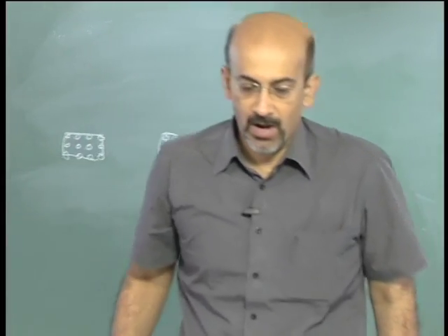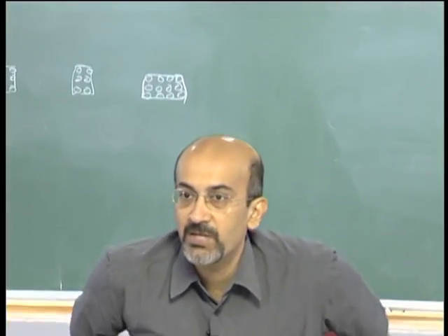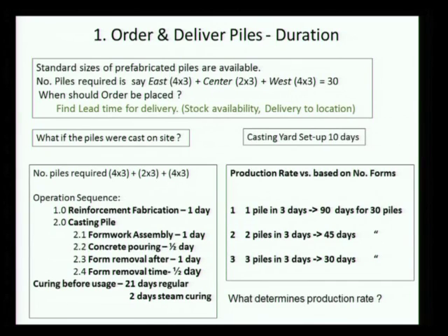Now, I'm not giving you information on the depth of the pile or the dimension of the pile because we are assuming all that is fairly standard. We should get into that detail if we were doing real planning, but right now we are just making an assumption for classroom purposes. So if I were to do a delivery, I just find it's going to take 1 month from when I place the order to get the piles, and I have to place the order 1 month ahead of when I want the piles.